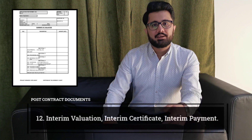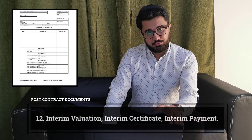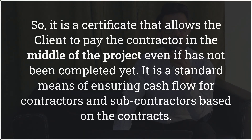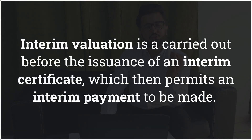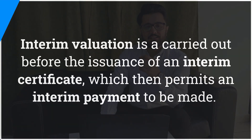Once the contract is signed, all parties are subjected to what has been stated, and the contractor can begin the project immediately. A payment certificate defines when and how a contractor or subcontractor can claim payment — whether after 15 days, 30 days, or 60 days. It is a certificate that allows a client to pay the contractor mid-project even if it has not been completed yet, ensuring cash flow for the contractor and subcontractor based on the contract.